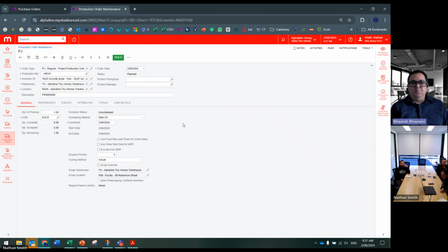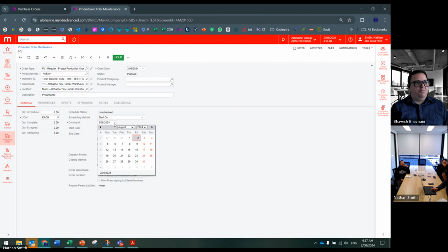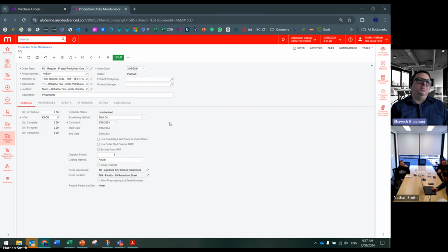So the constraint date is important. If I plan to start working on this house maybe in October, my start date would be 1st October, for example. Or if it's September, it will be 1st September. That's more realistic. Okay, 2 weeks from now. So how much time do the suppliers generally take to get the material to you? What is the longest lead time any supplier might take for your first operations to start, so that you can begin your first operation?